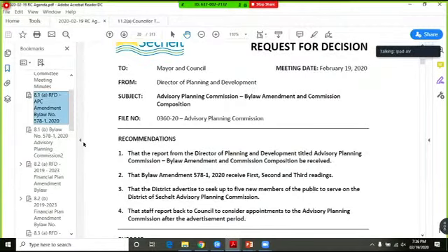The Wakefield lift station has suffered several failures previously, various electrical failures, pump failures, and rusting failures, resulting in sewage discharge into the ocean. The district conducted several investigations to determine the cause of failures, and it was determined the existing wet well is undersized, has issues due to faulty electronics, is threatened by climate change, sea level rise and storm surge, and its infrastructure is too old to update. The replacement and upsize is required for current use and future growth.